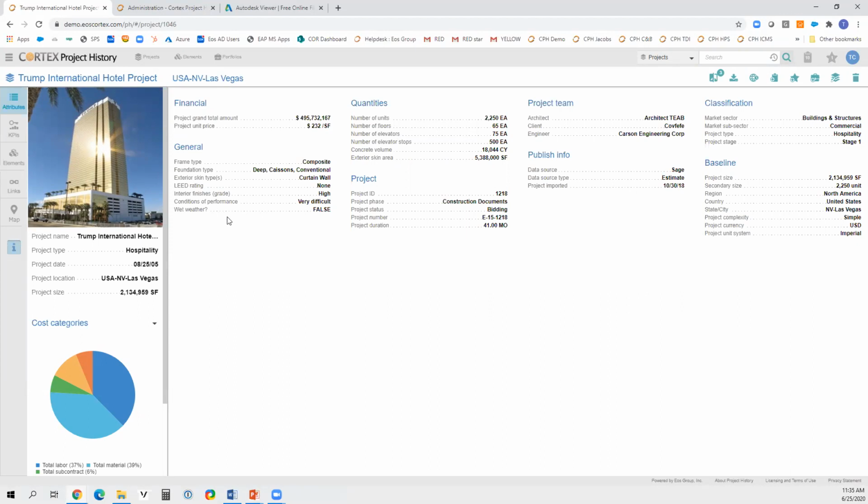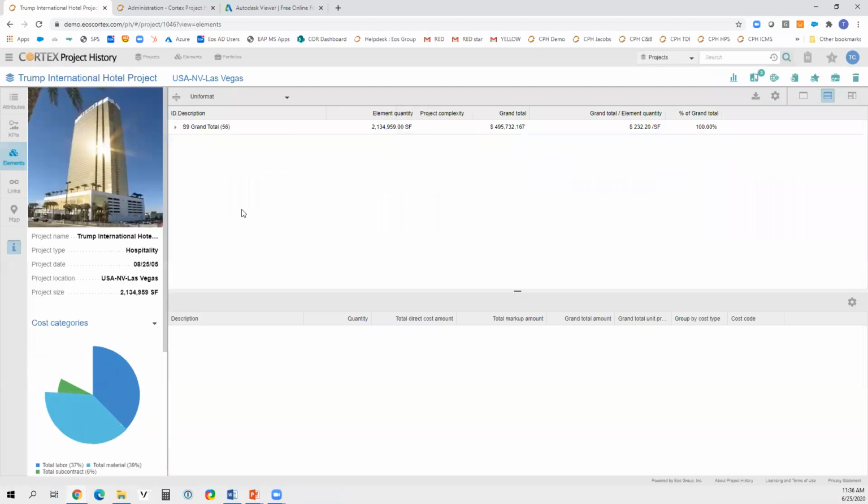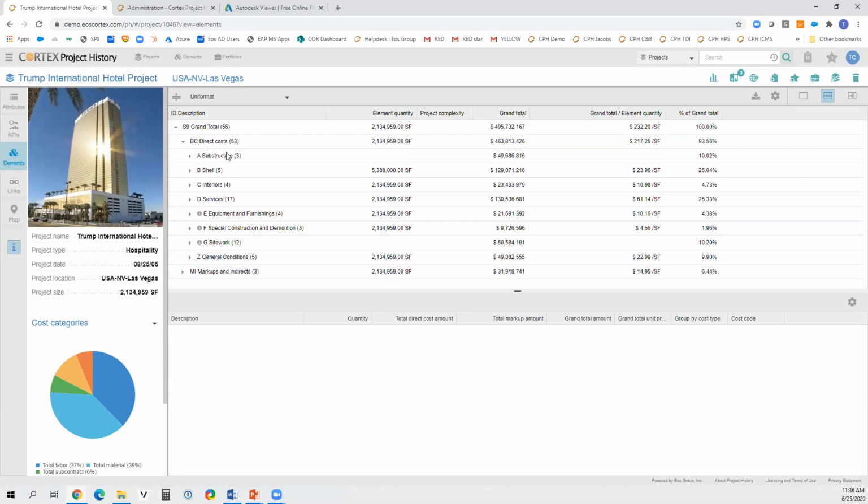You might create an attribute called sub-projects included, in which case it could be a checklist of components that are there. We have clients who've actually introduced the components as part of the cost structure. So rather than from here going right into direct costs and then the unit format in this case, we could actually nest in here the tower, then unit format, the parking deck, then unit format, and so on. So you've got some options there. It kind of depends on your business requirements.